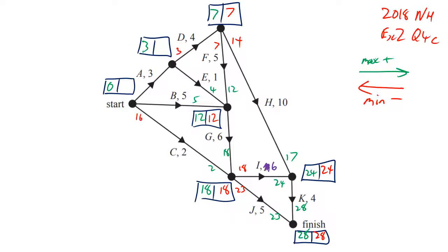That's probably going to be the right number, but if we do 12 minus 4, we get 8, so I definitely choose the 3. We've also got a 5 coming, a 7. 12 minus 5 is 7, and then 3 minus 3 is 0. So between the 0, the 7, and 16, I choose the 0.